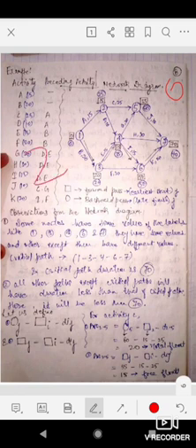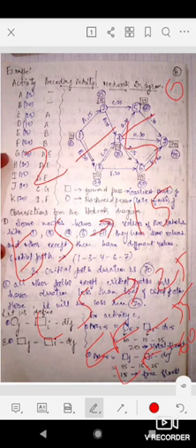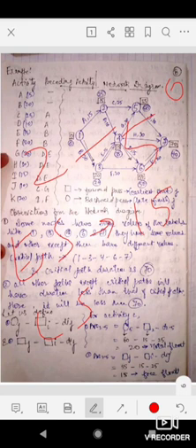See, for arc 2 to 5, earliest start time is 15 and latest start is 25, and earliest finish time is 55 and latest finish time is 60. So these 4 times we can calculate, or observe, from this precedence relationship. If you make this precedence relationship by moving forward and backward, then you can easily tell all those 4 times: earliest start time, latest start time, earliest finish time, and latest finish time. So these things we have discussed in this example.